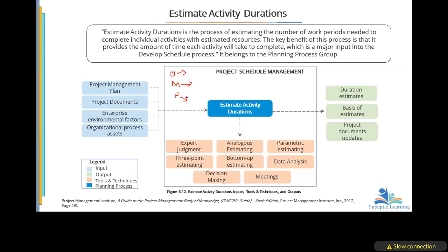Then the pessimistic is when you are not too sure, but because of certain risks, you think it's like the worst case scenario. So this is the best case scenario. This is the worst case scenario. Then this one is all things being equal. The accountants will say ceteris paribus. So that is the 3-point estimate. We'll be looking at that in detail. We usually use that to estimate the average and then the standard deviation. The standard deviation helps us in doing what we call the buffers.